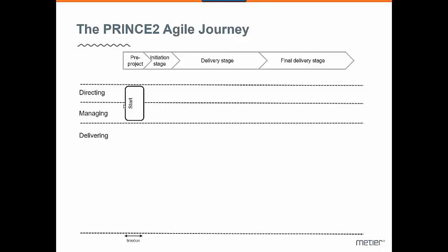You're going to talk about the product description as well. Yep, you may call it an epic. It may not follow the product description in the PRINCE2 manual. It can be in the shape of user stories, very high-level user stories, one or more. You can write sort of an epic value statement, what you're going to deliver.